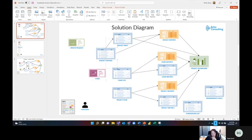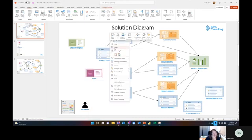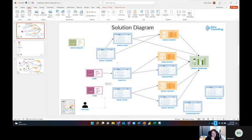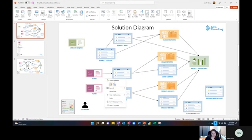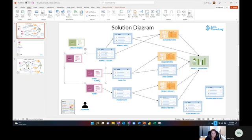One place I typically have a form is for new risks or new issues — so I'll add a form connected to the create log. I also have a form for the project plan so that team members can add new tasks without needing direct edit access to the project plan, which could accidentally mess things up. I also sometimes use one for the requirements sheet, but I won't go into that here.